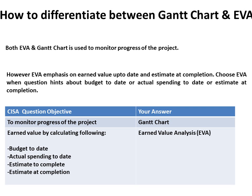Both Gantt chart and EVA are used to monitor project progress, but EVA specifically emphasizes earned value up to date and estimated completion. Choose EVA when the question hints about budget to date, actual spending to date, or estimated completion. If the objective is simply to monitor project progress, the answer is Gantt chart; however, if any of those specific financial/completion metrics appear, the answer should be Earned Value Analysis.